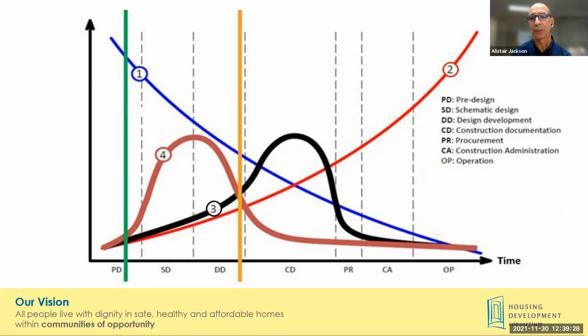be really important. So it's key to initiate this exploratory early so that the necessary combinations for your selected balanced ventilation plan are ironed out in the entitlement phase, so that cost-saving variances and code alternatives can be pursued and resolved before detailed design documents are developed. So that's the kind of key to the process conversation here.